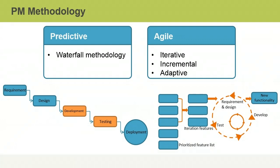Adaptive life cycles include very short iterations, no longer than four weeks in duration. The adaptive approach requires a high degree of customer involvement and is used for projects in which scope frequently changes.